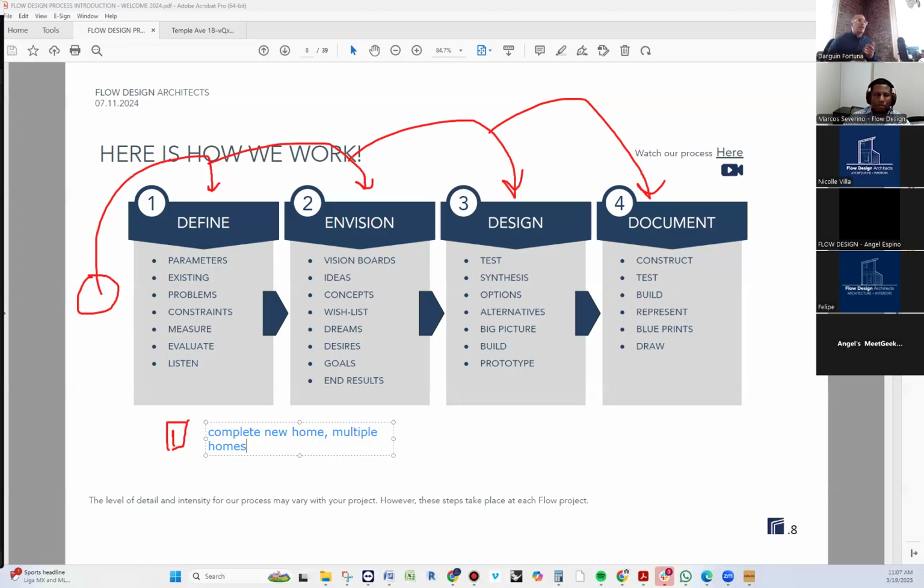Either you're going to provide it within the architectural office, or the client needs to provide it, but I want you to be aware that it will be required. Now, let's continue with this one, and I'll tell you why it matters, so that I don't confuse things. So new construction, home, you have to do it, no matter the city, no matter the municipality. That's the base code now.